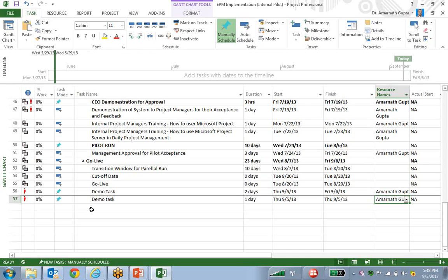Because the very important thing is the critical path. It cannot be the case while executing a real project, Mr. Michael, that if I am going to postpone a task, it is going to affect my entire project delivery. It cannot. Yes, there are certain tasks which we know as a critical path. If something is going to change in the critical path, definitely it will affect my delivery date. But if some tasks or activities are not on the critical path, then it will not affect my date. Of course, I can shift it. Of course, I can shuffle it.